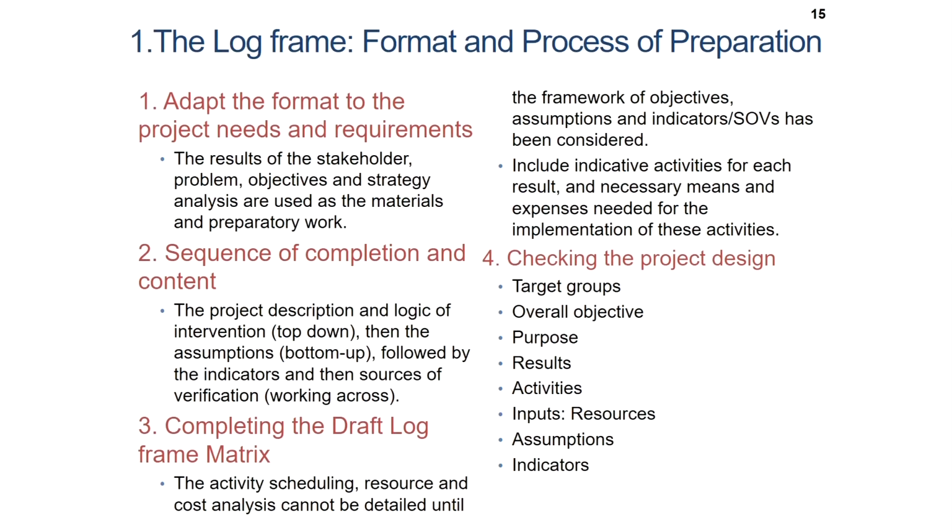And when we are thinking in terms of measurable outcomes, we obviously will have a certain set of assumptions as well. So, let us again first look at what are the components of the logical framework matrix or the log frame matrix. There are formats and processes of preparation. So, one is we adapt the format to the project needs and requirements. The results of the stakeholder, problem, objectives and strategy analysis are used as materials and preparatory work. So, all that we did in the analysis stage can be used as preparatory work.